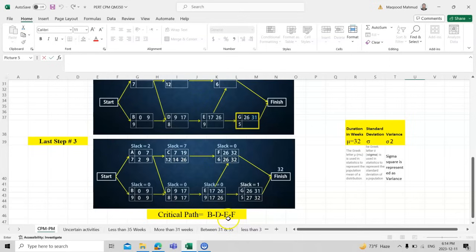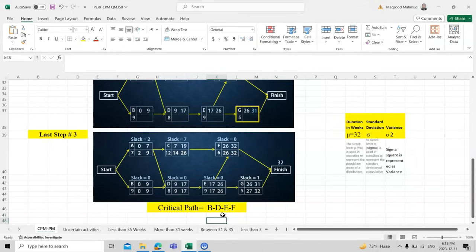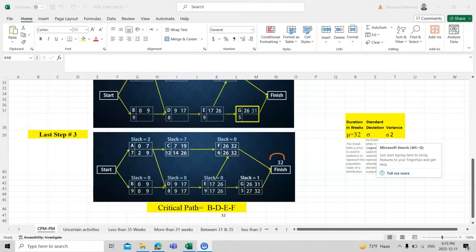The critical path is B → D → E → F, since all have slack zero. We can also verify the mu value using the critical path: B = 9 weeks + D = 8 weeks + E = 9 weeks + F = 6 weeks = 32 weeks, which matches our earlier mu = 32. So mu can be found both diagrammatically and by summing the critical path activity durations.